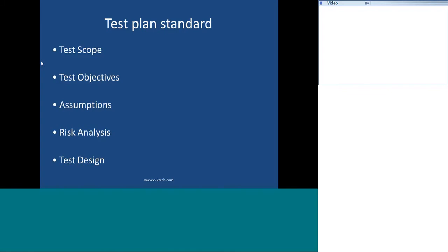So risk analysis plays an important role, and here you will identify the risk, and you will prepare a plan B for all the risks. If that risk is posing a threat, how are we going about it, and we also talk about risk management. And there are certain risks which the team will be ready to accept. One of the risks is schedules. If they are not going to deliver it and we have a strict deadline of 2 months of testing, if the development team has delayed it by 1 week, we may end up not covering all the functionalities.